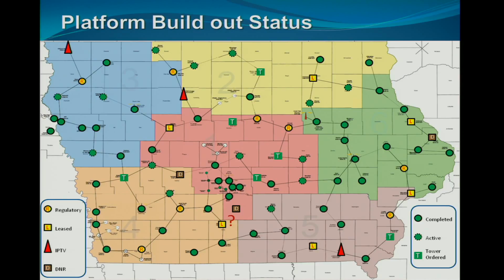Yes. I can say that a 2.5-year schedule is extremely aggressive for statewide implementation. Again, for me, it's unique to Iowa. Usually, this can be a 5-year implementation timeline because there's lots of hurdles to overcome. So we're doing a lot of stuff in parallel. I'm pretty sure you guys remember the presentations where we've done a lot of stuff, not waiting for other things to clear, just so that we can keep the train moving. So it's very aggressive. We've got lots of teams, a lot of work happening. When it starts to become real, then it doesn't matter. It's not fast enough, right? Yeah. Thank you.